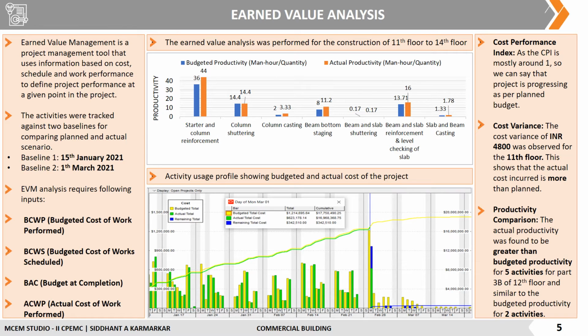Earned value analysis. The earned value management is a project management tool that uses information based on cost, schedule and work performance to define the project performance at a given point in the project. The earned value analysis was performed for the construction of 11th floor to 14th floor. The graph here shows the budgeted productivity and actual productivity for different activities. The activities were tracked against two baselines for comparing the planned and actual scenario.